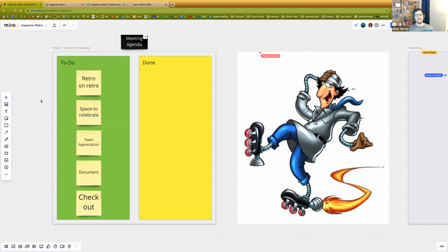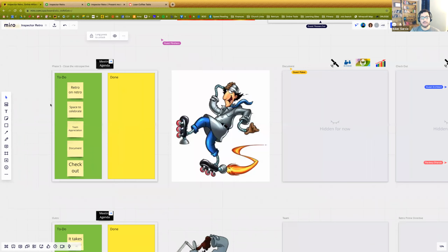Okay, I'm just going to overview this and then stop talking. It's this. At the end of the meeting, save some time, do a retro on retro. Ask the team for feedback, just like I'm about to do. By the way, if you have any feedback for me, please put it in the feedback section. Ask for feedback, how you can get better in the retrospective.